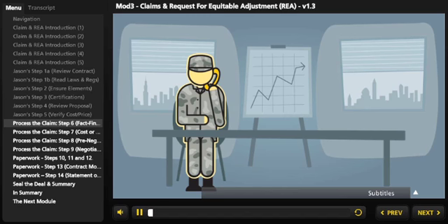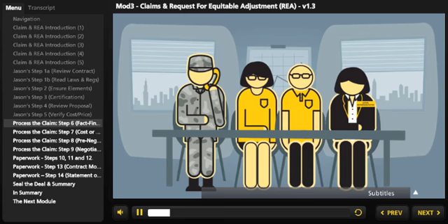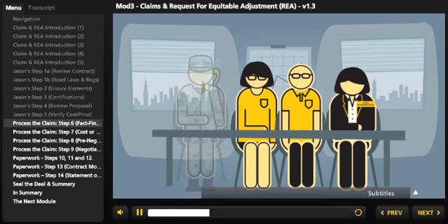Now that Jason has a complete package and a clear understanding of what the contractor is claiming, he calls his team together for a meeting. In the meeting, they begin to review the documents and the steps necessary to process the claim. Jason holds a fact-finding session with his technical and legal team. Jason verifies that this work was required, completed, and approved.